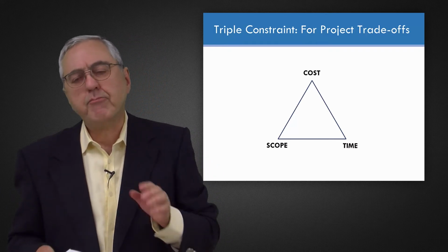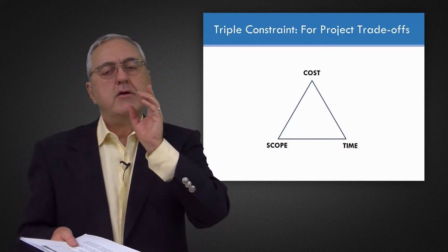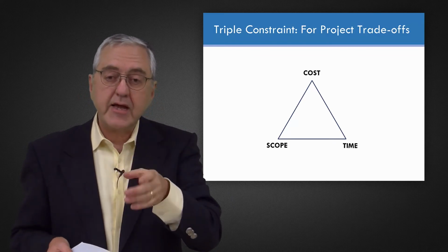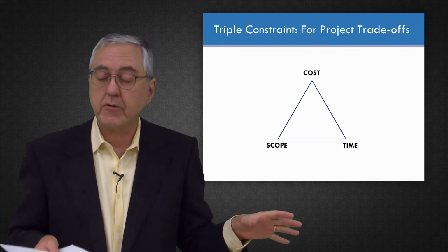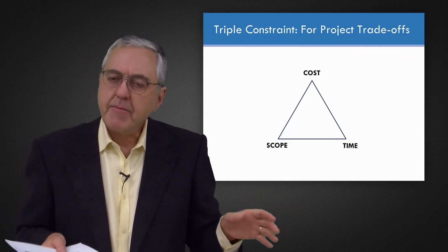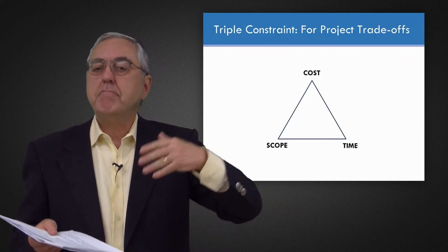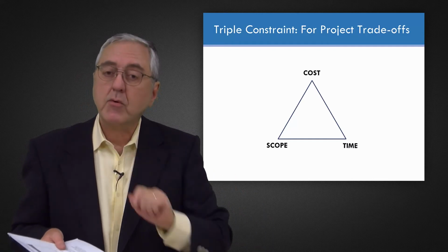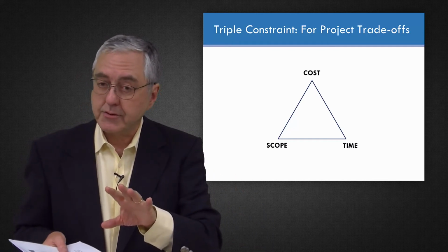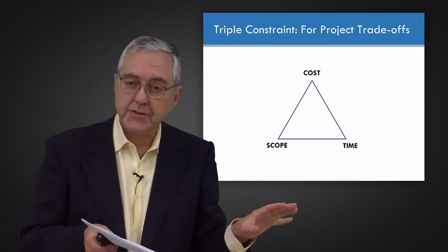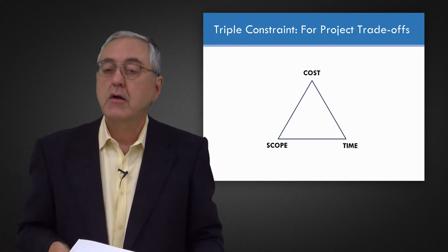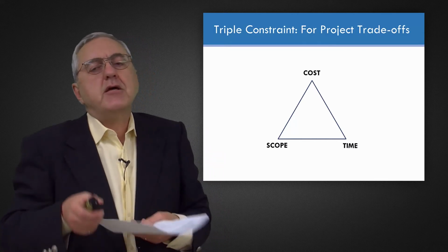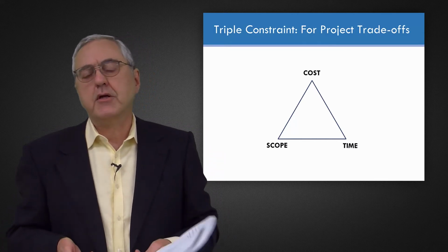If time is more important than scope, like we as a company really have to get this physical product or software product to the marketplace by November the 1st, maybe if we're going to be missing that deadline, we're going to agree on some scope reductions. Sometimes it's called a lean list. Some things can be removed from the scope in order to be sure we've met the time. So let's be aware of trade-offs among scope and cost and time.